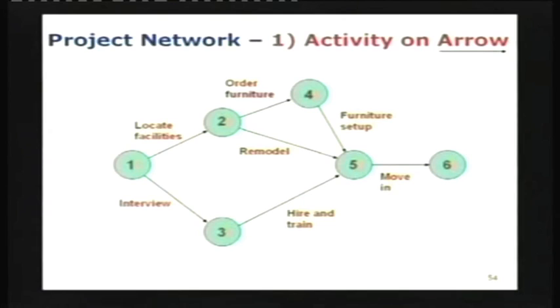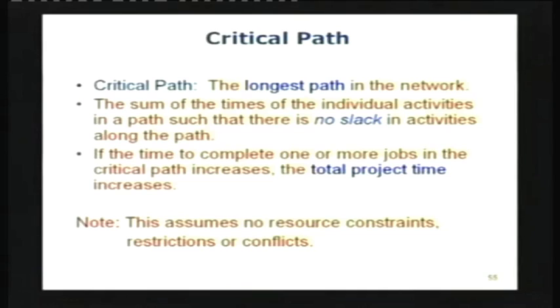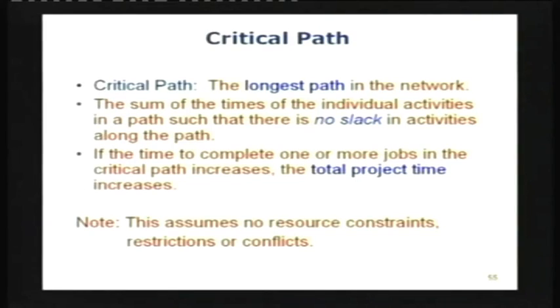So my basic network is set up here. Now I have to bring in additional information, which will be time information. In fact, the thing that I would like to discover is the longest time taken to complete all the tasks, because that's going to be the duration of the project. Now, some of you who have been working in project management, it's kind of obvious that you need to find this out, so that then you can actually commit to a particular deadline. You can actually tell them, I'll be done by, let's say, March 15th, I'll be done with the project.